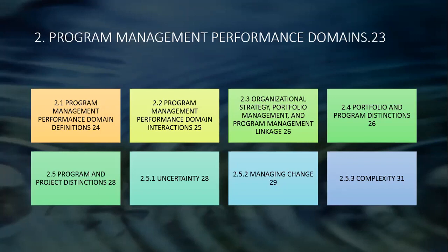Issues related to change should be addressed differently within programs and projects. Projects deal with change in terms of scope, schedule, cost, and quality. As many of you have learned, as with uncertainty, programs should be better equipped to deal with change because they have the ability to change the direction of a component, cancel a component, or start a new component. In both programs and projects, there should be a rationale that justifies that the advantages originating from a proposed change will outweigh potential drawbacks.